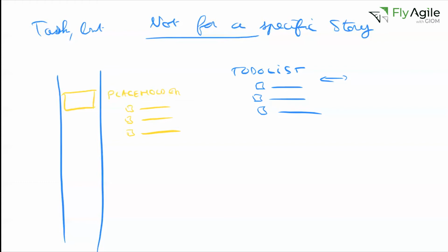But there's also an alternative that I've seen working that I kind of love. Here's what I'm picky about not putting. I advise beginners in Agile against putting task placeholders in the product backlog. The reason is that when you begin, people tend to always look at tasks. It takes a mental habit and gymnastics to look at things from a product point of view and write user stories. Because it's the hardest habit to get, I want you to be focused on that habit first. So first, try to only write user stories in your backlog.